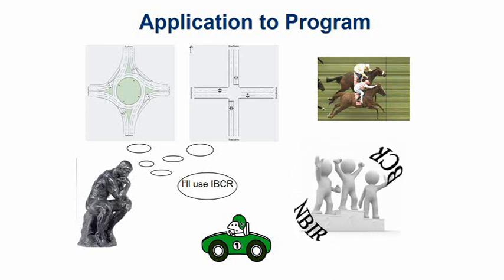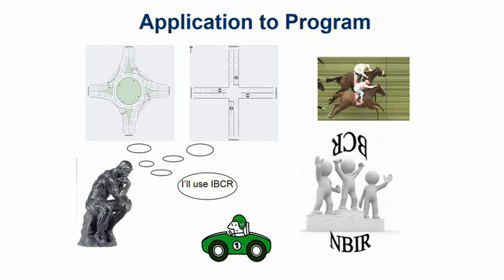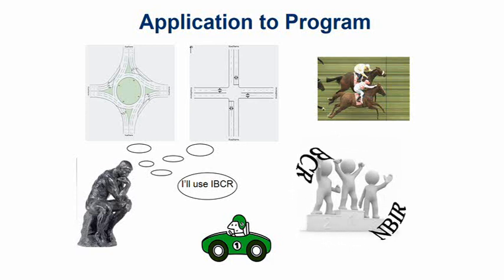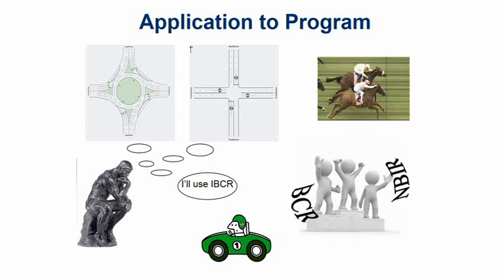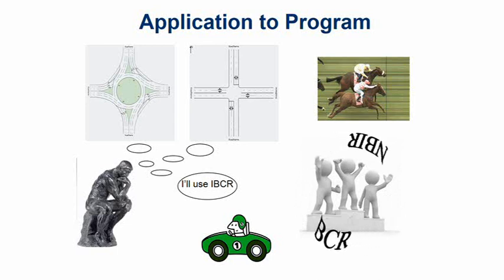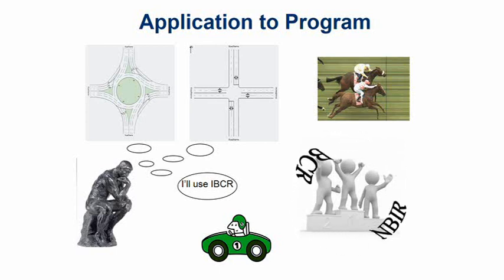And CARP was, well, the second part of CARP, the program model, actually you can put all your options in there and can make comparisons. And those comparisons were done using the incremental benefit cost ratio. And that was used to determine the optimal option to actually proceed and compare with the other options within the program itself. And for that, we used the benefit cost ratio. So we're actually comparing the projects to determine a ranking using that.